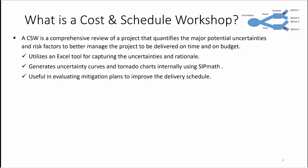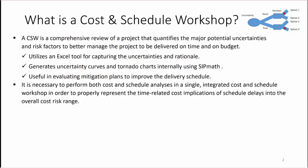It's useful in evaluating mitigation plans to improve the delivery schedule. It's necessary to perform both of these at the same time — both the cost and the schedule — as an integrated workshop, in order to properly represent the time-related cost implications of schedule delays into the overall cost-risk range.